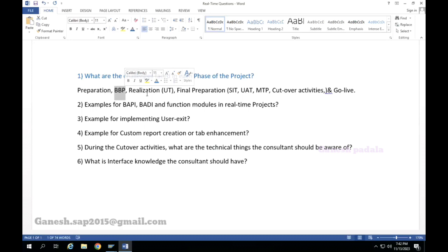So understanding the deep knowledge about the business processes is either not properly provided by the business or not properly understood by you. How you are preparing the To-Be, the notes were not written properly. Then when you are preparing the To-Be, the requirement is at 80 and your preparation is at around 65, 70. So that gap will be there. If they didn't review properly, then you will configure accordingly, and during SIT or UAT, you will find the gap. It's basically the understanding issue between the business, that issue, and how deep you are going, and what are the possible scenarios we can ask as a consultant.